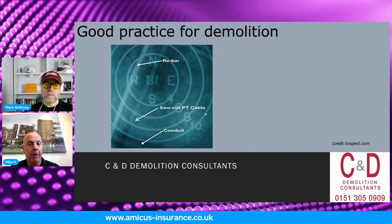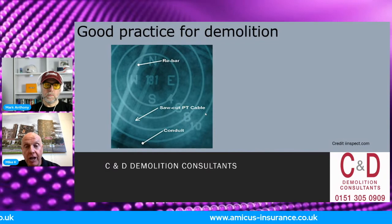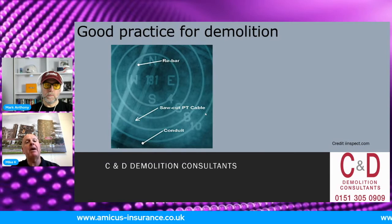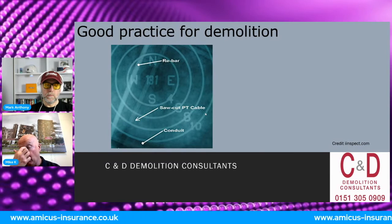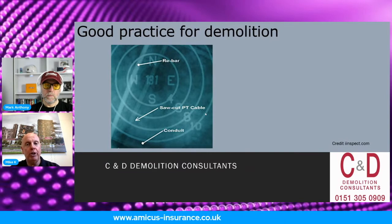And moving forward, we can X-ray the floor slab. We can do it a meter by a meter. We can see what reinforcing is in there. If there's no reinforcing in there, we know we've got a problem when it comes to demolition, and we may have to create an exclusion zone. We may have to do it under emergency conditions, but we're now armed with information about what's in that car park before we start demolition.